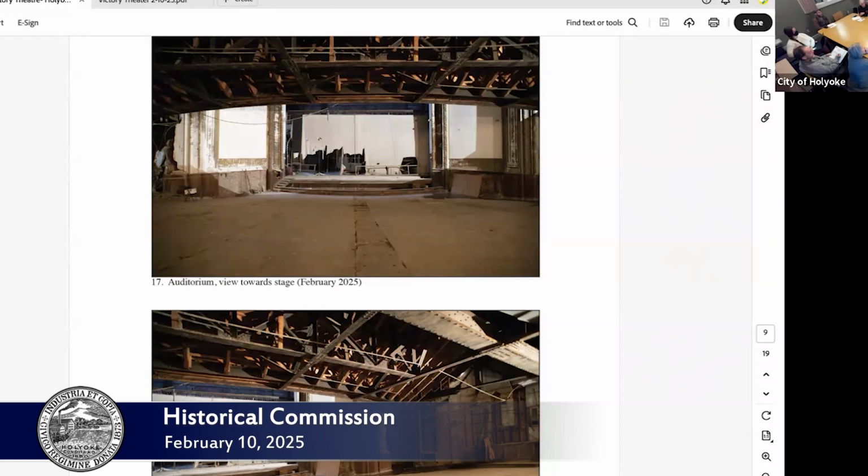Going forward, we are implementing a compliance form, which is not necessarily relevant to this meeting. For the next round, there will be a compliance form, which will require a sign off from the building department and planning department. I'm just thinking that if that was being implemented for this meeting, the planning board would not sign it. And that's my own thinking; I am in absolute support of this, and I see no issue. My only thing is we have two city departments that have not yet really given their official opinion on this big change to a building. I don't see any issue with the change. That's just my only hesitation. But they couldn't have, because they haven't resubmitted the plans from the architect. It makes sense to me why they didn't know anything. They know about it, but they don't have the new plans yet to approve or deny anything.